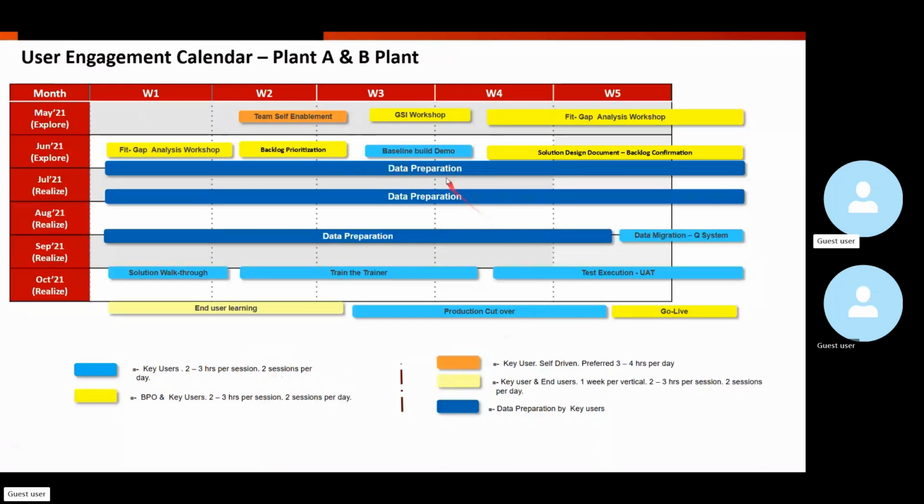For baseline build demo, then data migration, then solution walkthrough, train the trainer, these things will involve the key users alone, and that will require almost 2 to 3 hours, and per day 2 sessions, one in the forenoon and one in the afternoon, basically.